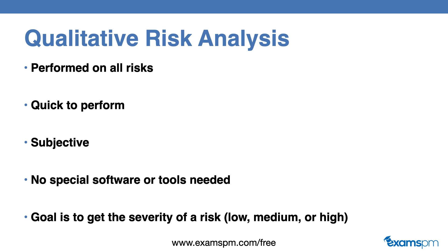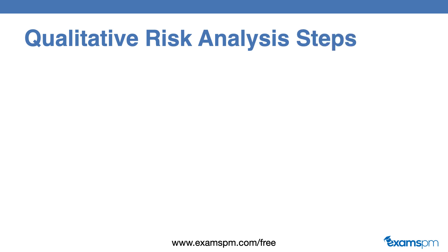The reason we want to do this is because it will allow us to see where we want to focus all of our efforts. We want to focus most of our risk management time and efforts in the high severity risk section. Qualitative risk analysis allows us to sort through these risks, and only the high severity risks will move on to the quantitative risk analysis, where we will do more analysis and come up with a fallback plan.